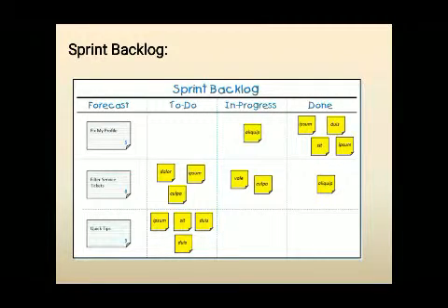During the sprint planning meeting, the team selects some number of product backlog items, usually in the form of user stories, and identifies the tasks necessary to complete each user story. Most teams also estimate how many hours each task will take someone on the team to complete. In the sprint backlog, the Scrum team works out how the user stories would be implemented in a sprint by dividing them further into tasks and estimating them.